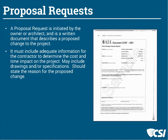Often we want to request that a change occur, and there are forms for that. This is an example of an AIA document used to suggest to the contractor that we'd like them to send us a proposal — something we found and could they please give us a number. That needs to come with complete and accurate information so the contractor can price it and assess the impact on the project schedule. It's incumbent on the design side to provide adequate, thorough, and complete information so that the proposal can be accurate.